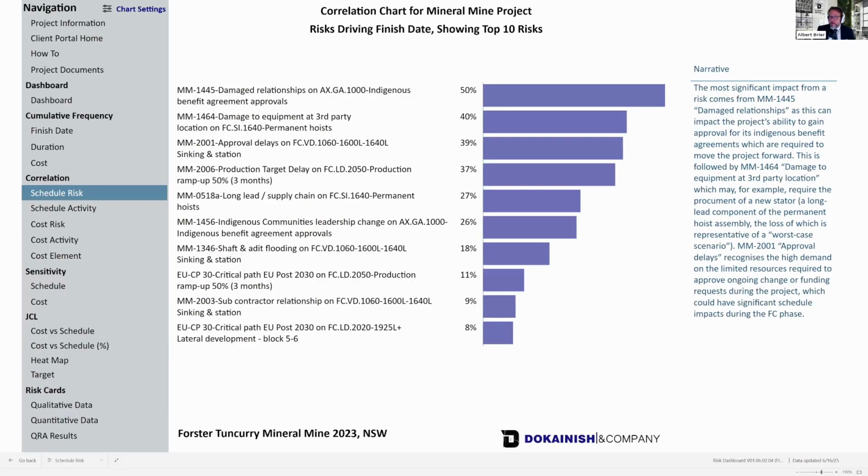Now, having said that, and this is something that our tool cannot replicate in Safran Risk yet, okay? But in Safran Risk, if you run a Monte Carlo simulation on an integrated cost and schedule model, and then go into their scheduling suite, you can see how the model configuration has impacted each individual activity at various confidence intervals. So for now, at least, if you want to see on a per activity basis how the risk model is behaving, the best place to do that is Safran Risk.